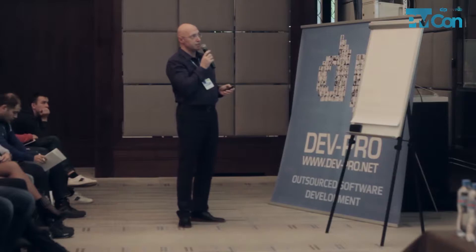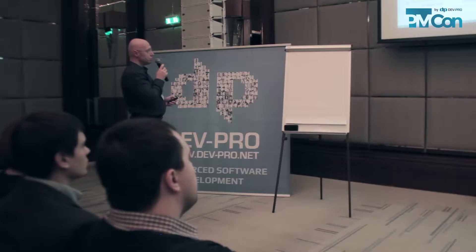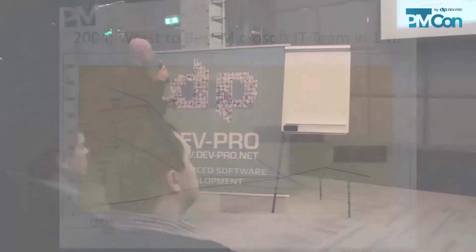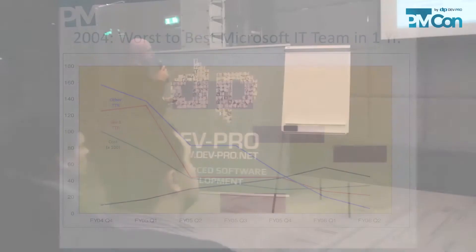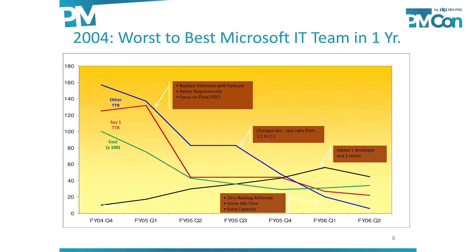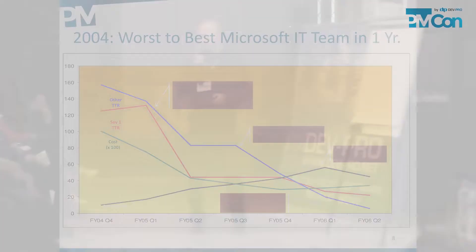Another line shows cost: on average it was a little over ten thousand dollars per request and went all the way down to about twenty-five hundred dollars — a four-times reduction in cost. Productivity went from about nine to ten things per quarter up to close to sixty — the same people doing the same type of work.